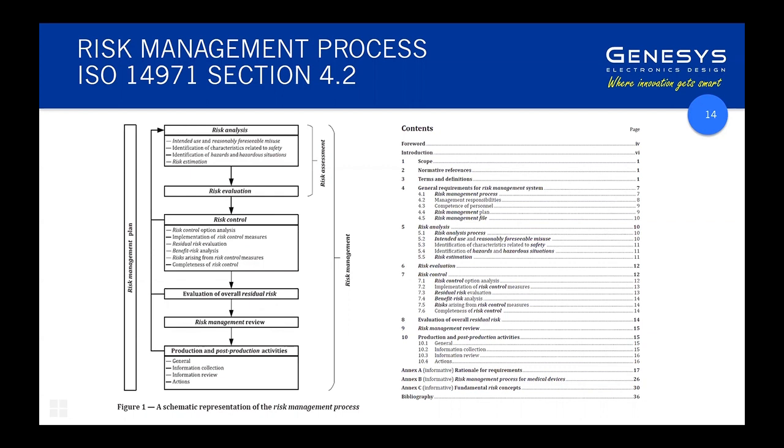And if the scalpel is to do its job, that risk must be there. You can't have a blunt scalpel because you don't want the surgeon to risk cutting himself. So the risk-benefit analysis is that the surgical effect that you can achieve by using a scalpel, the benefit of that outweighs the risk of the surgeon cutting themselves or breaching their sterile barrier of their gloves, for example. So it's a good example of a risk-benefit analysis.